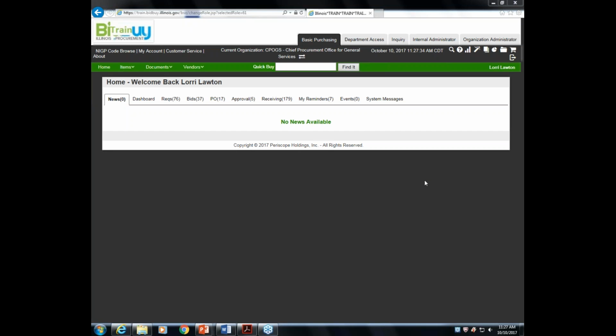The agency, we have a question statement: the agency does not obtain signatures until we receive the vendor signed copy. So the process will be that the vendor sees that print PO, signs that PO, and returns it along with any other documentation required, to turn back over to the agency for review or confirmation. At that time, once the vendor-signed PO is received, the agency will sign and move forward with the rest of the process and obligation and so forth.